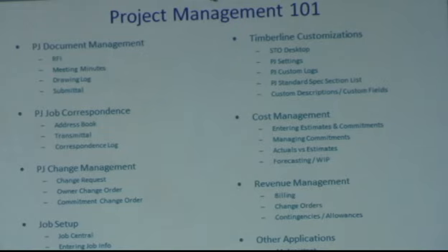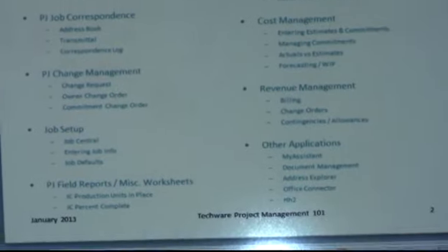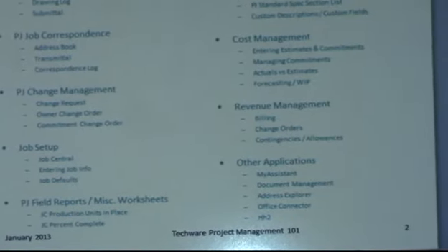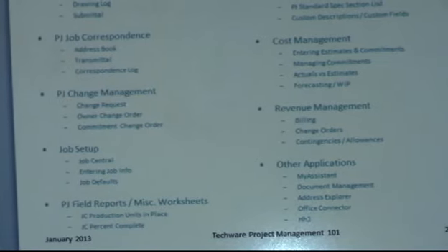And then in terms of job setup, with the project management module, you do have the option of setting up jobs that are project management only and not accounting. And that can be useful if you want to track project documents during the bid phase. So if you have a lot of jobs where you're tracking drawings, tracking RFIs before you win the job, you can set it up in project management to track all of those things, log the emails, do all of the non-accounting things without affecting the accounting side of the business. And then if you win the job, you can go ahead and switch it over to the accounting side as well. And then you already have whatever email history or document history set up. So for some companies, that's a really great thing to do.